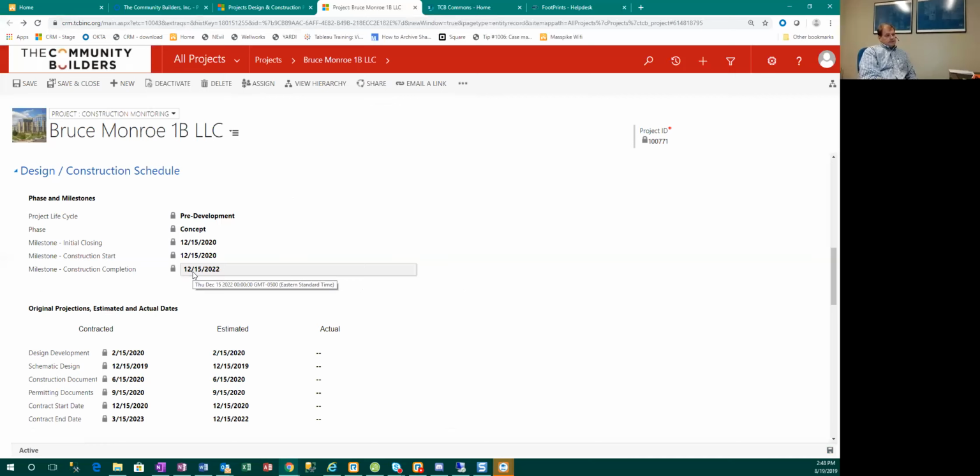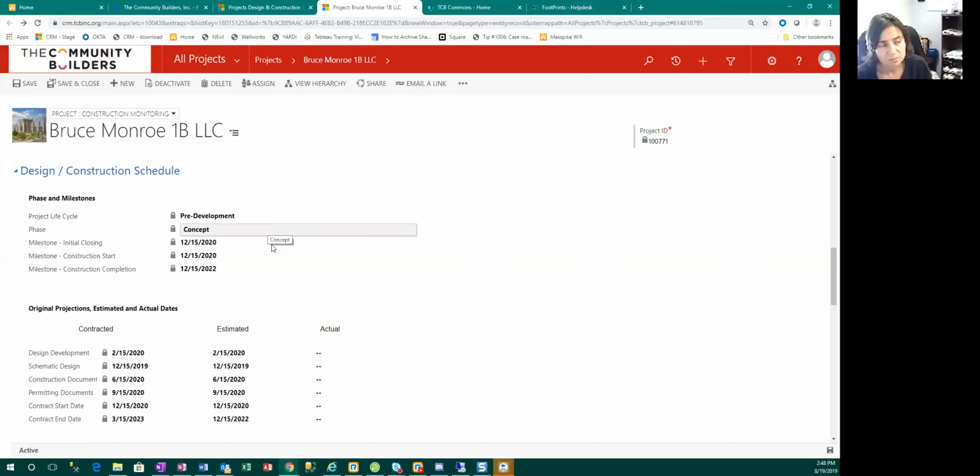So that's, yeah, you're right. I'm being a little loose with the language. What we've tracked in our spreadsheet is our permission to occupy, and we've said that our contract will end 30 days after. So Rhonda, can you make a note to add permission to occupy in between contract start date and contract end date? Contract end date is final completion, closeout docs in hand. That's right.